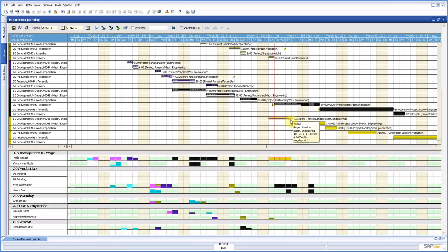So I can say, okay, I pick up these 4 hours and I put them here with Vincent. With Vincent you also see here that he has 2 white spaces. That's because in his calendar it says he only works 3 days of 8 hours, which is the 24 hours of capacity you have here. So this way you can just pick up time and give it out. Very straightforward. And here you have directly a complete overview of the load of your personnel, machines, whatever you need.